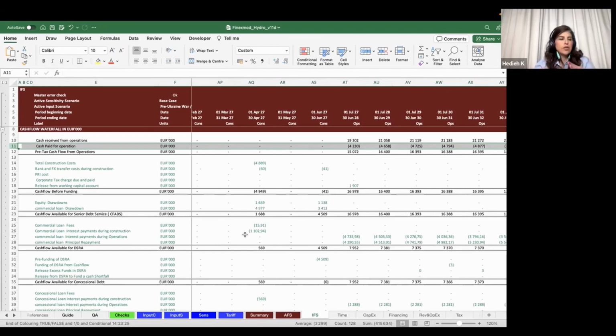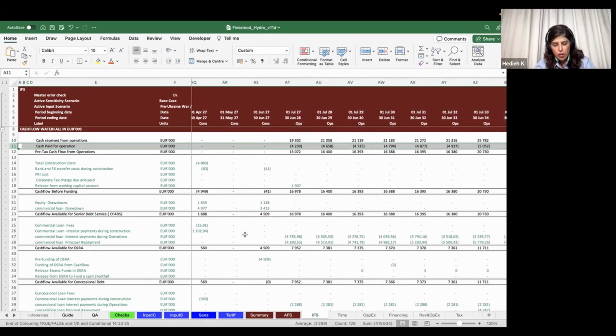In the construction phase, you have a schedule for all your cost items, and you have a drawdown schedule as well. So the priorities are not something that is discussed. They are set by the contracts, and by the schedules and budgets that we have. So the importance of ranking comes post-construction.